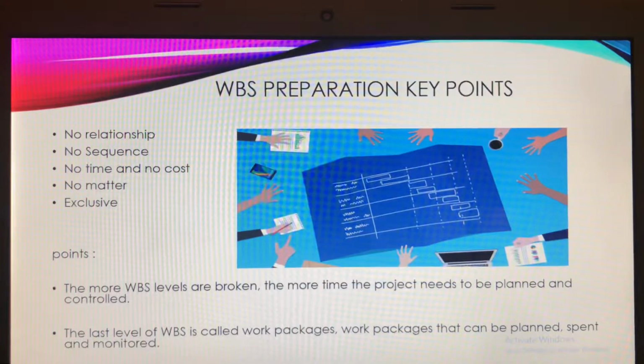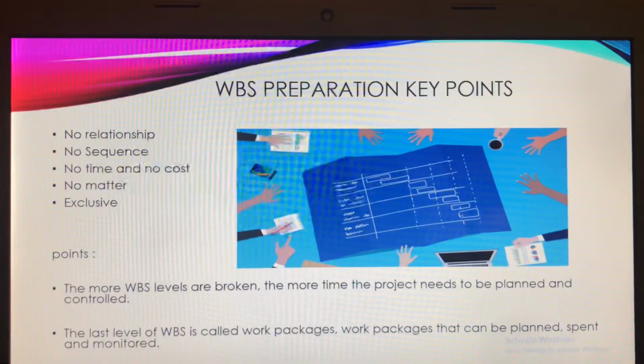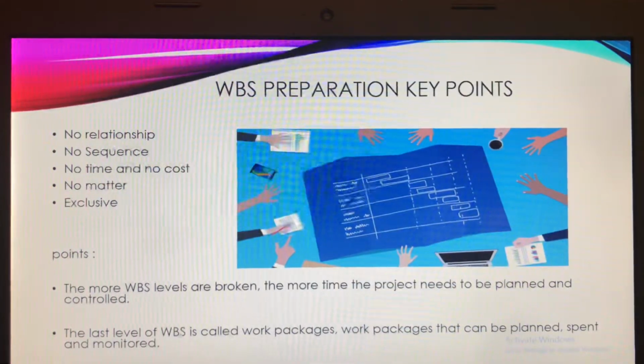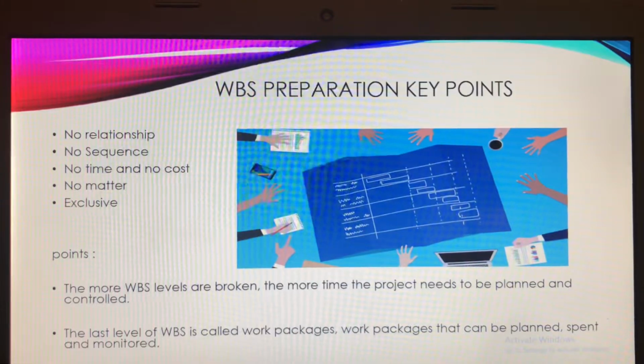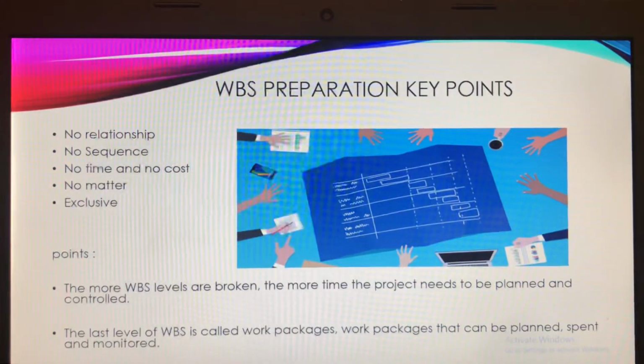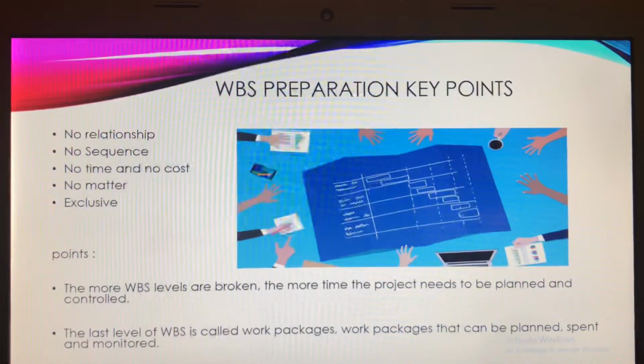WBS elements do not include time and cost. No importance. WBS elements and component levels have no priority over each other, and unique WBS components must not be duplicated. In other words, the components must be unique.